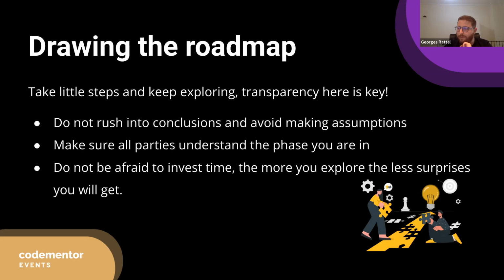So for example, if you develop the login page and then the main page to list, let's say, the main users of a platform. And then after defining that page and testing that page, you go ahead to testing the profile page, and then suddenly you start getting feedback on the page before. And then the feedback on the page before might affect the profile as well and the whole timeline of the project. So it's very important to make sure that, okay, in which phase are we now